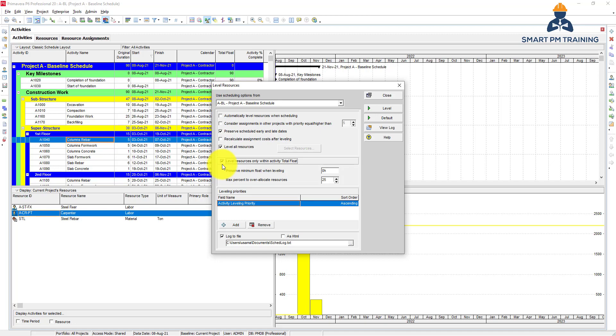You take some of the peak of the resources from the 10 days duration and equally distribute them over a 15-day period, not only 10 days. You add the total float and take it into account, but typically you don't want to do that.